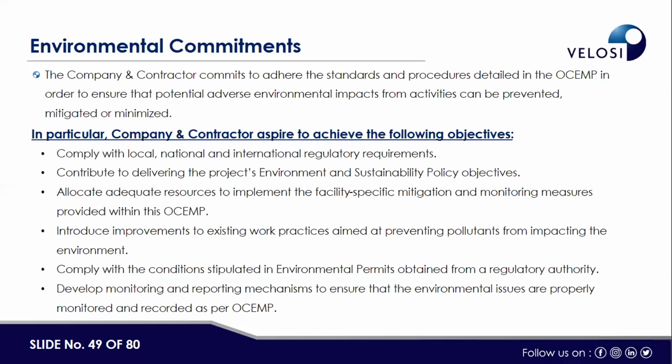Next question. So it seems EMP is subsidiary to ISO 14001 requirements. How can an EMP be specific with respect to construction and decommissioning or disposal stages? Basically, while explaining the structure of these management plans, I mentioned that in the CMP we have to cover only those impacts associated with the construction, in the OEMP only those related to the operation, and in the same way in the TMP only those related to the demolition or disposal. For example, if there is a high-rise building that we have to demolish, we have to develop the DMP on how the demolition waste will be managed, and, because demolition generates high dust, how that dust or particulate matter will be managed.